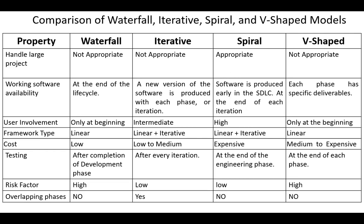Risk factor is high in both waterfall and V-shaped models, and low in iterative and spiral models. In waterfall, spiral, and V-shaped models there are no overlapping phases, but phases may overlap in an iterative model.